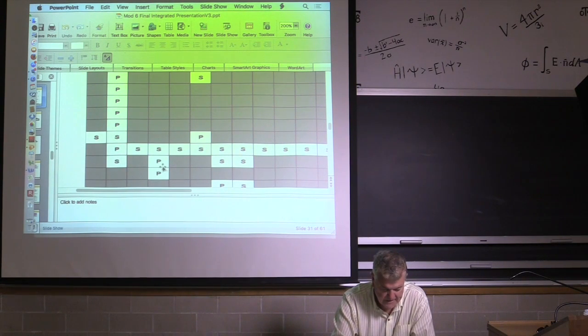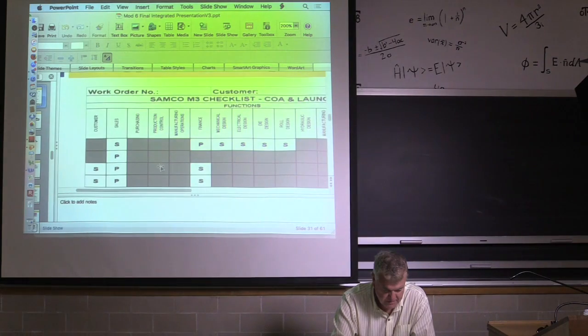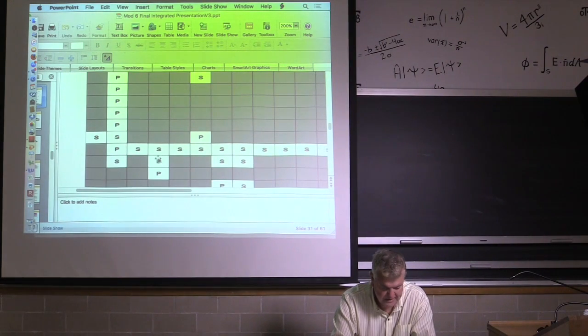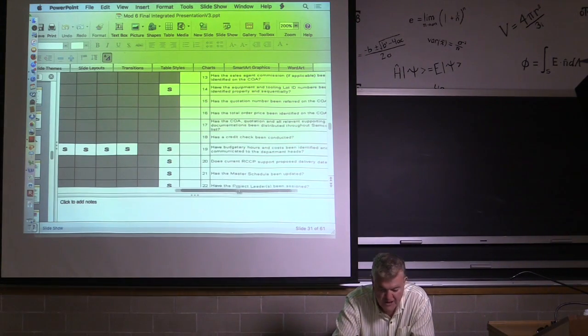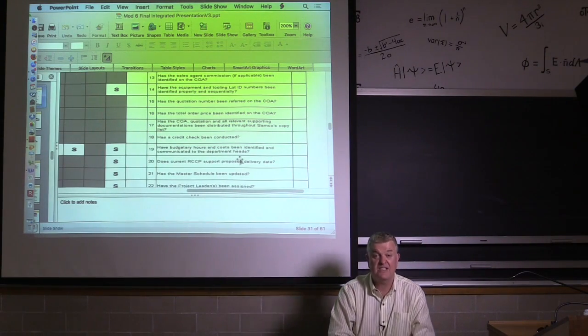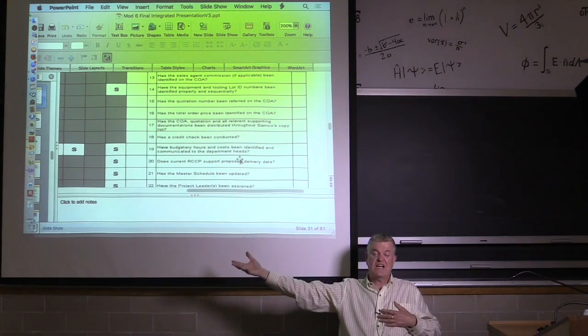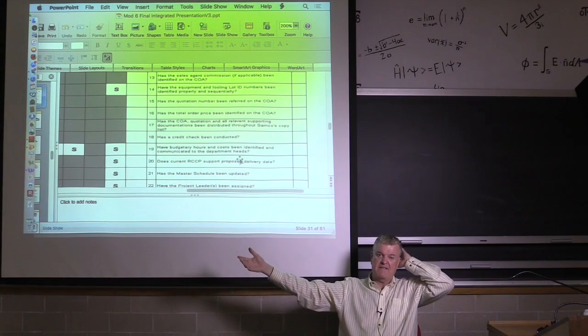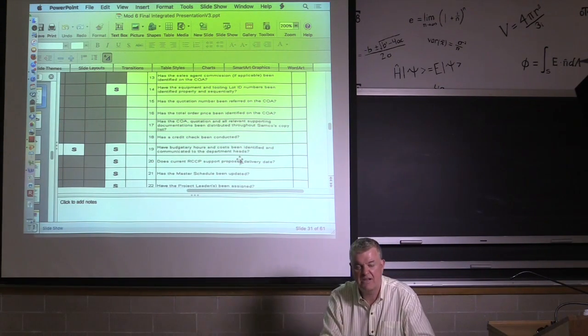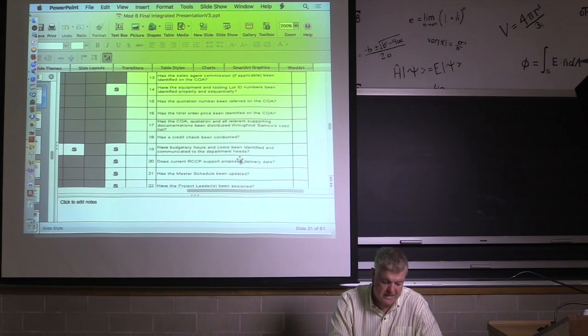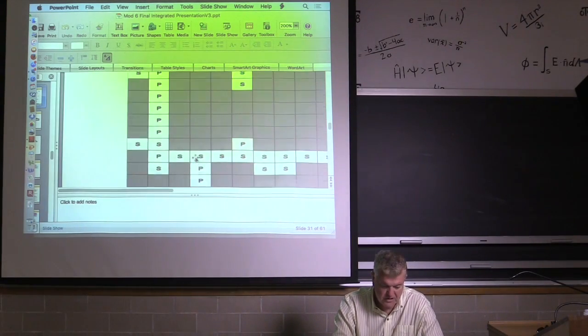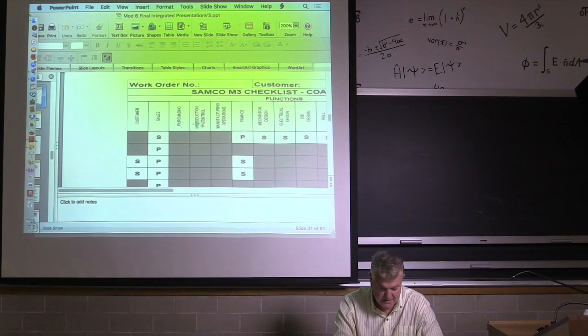And similarly, in this one here, it's the finance, production control. Let's look at that one. P for primary, and then supported by sales in a couple of technical areas. Let's see, does the current rough cut capacity support the proposed delivery schedule? So you have to look inside the company to make sure we have enough hours over the next 3, 4, 5, 6 months to actually meet this target date? And if not, do we outsource? Do we run another shift? What do we do? That's really what that's asking. And the primary purpose there is production control or materials management, these guys.